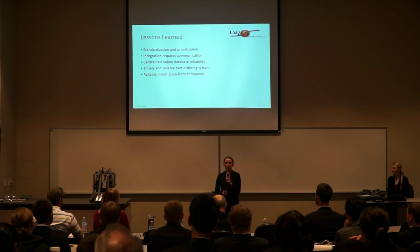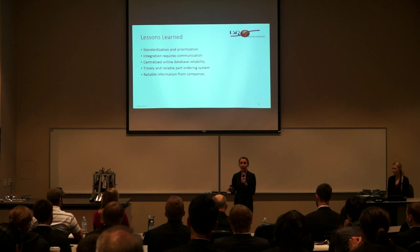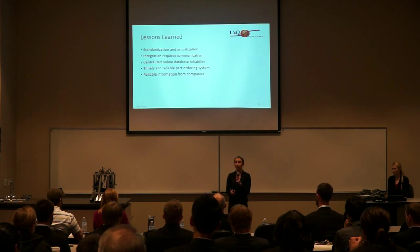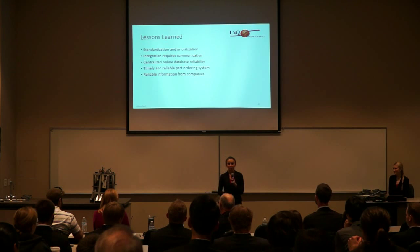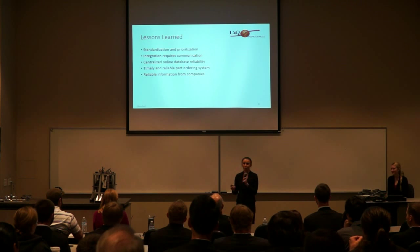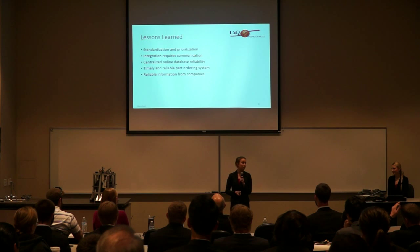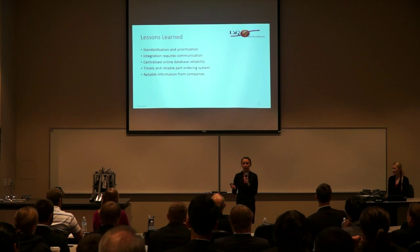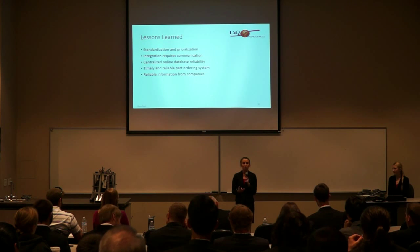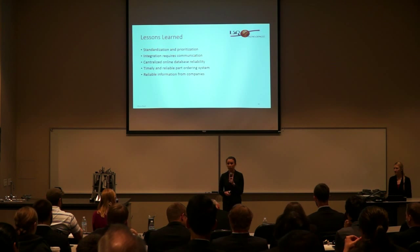We used OneDrive for our centralized online database, and an online database for everybody to access is amazing in theory. However, the OneDrive server tended to go down at the most inconvenient times, leaving us to be late on certain assignments. So in the future, I would suggest people find a different database, paid for or not. Again, part ordering was something that we had to deal with. Some of our parts were not shipped on time, ordered on time, and caused great delays in our fabrication process.